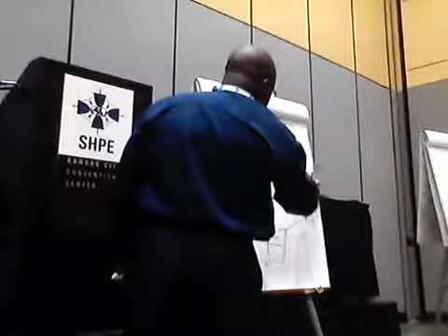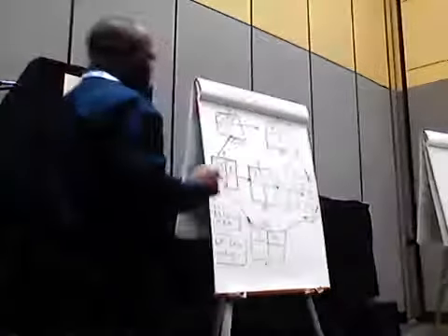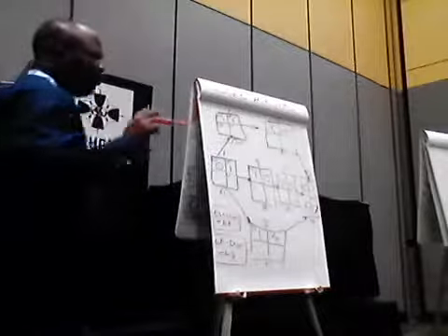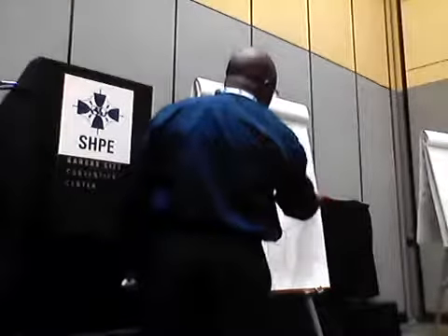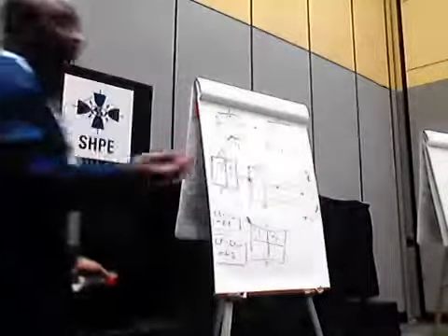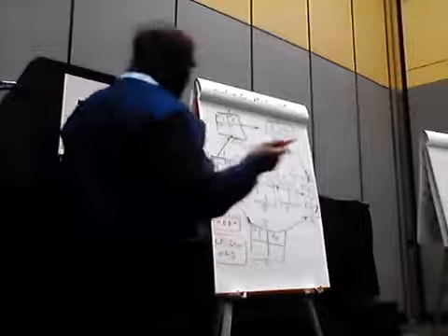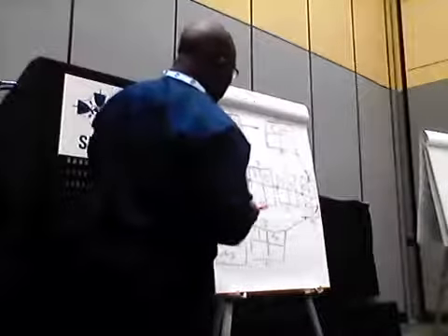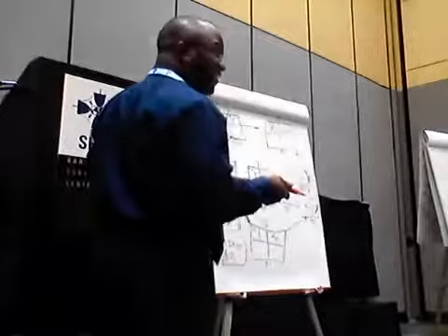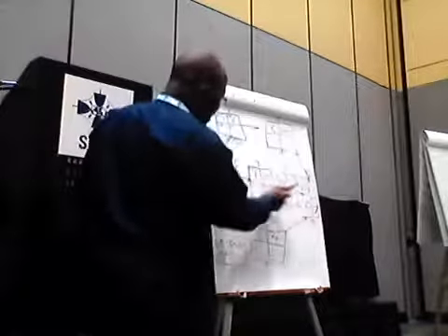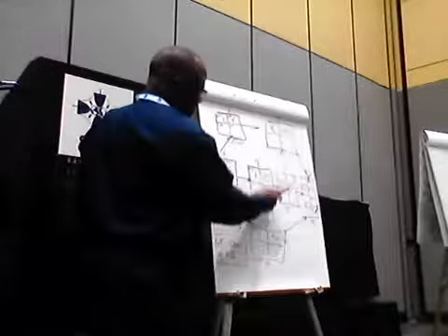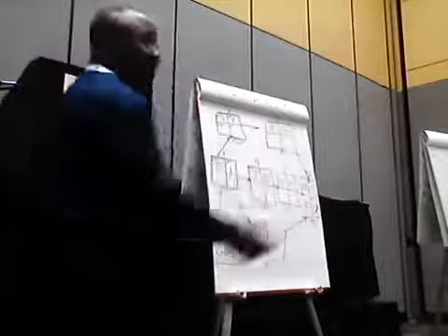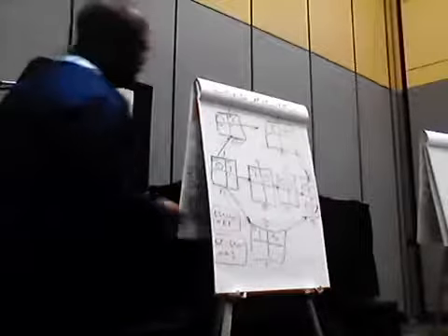You can see they kind of look the same. Do you know the trick? You guys found the critical path earlier. On the critical path, these numbers are all the same, as you'll find out. So you said the critical path was A, B, C, G? Yeah. So all of these are going to have the same early start and late start. I could cheat and just fill them in, but I want to show you how it all comes together.